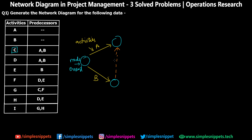You don't have to name the dummy activity, but it denotes that A and B meet at this event. Now I can start C from here, and C will reach a new event. Moving on to activity D — for D also A and B are required, so D starts from this same node. Multiple activities can start from one node, but two activities starting from the same node cannot go directly to the same other node — that's why the dummy was required.